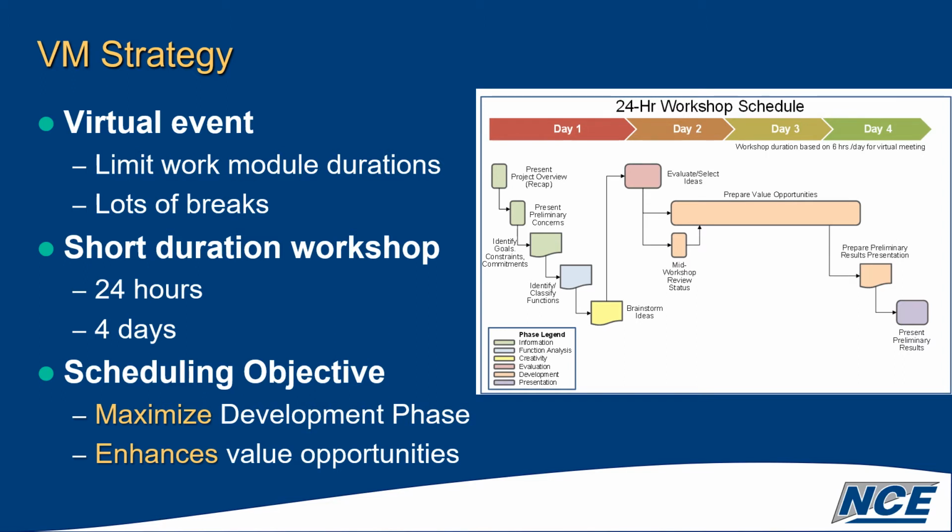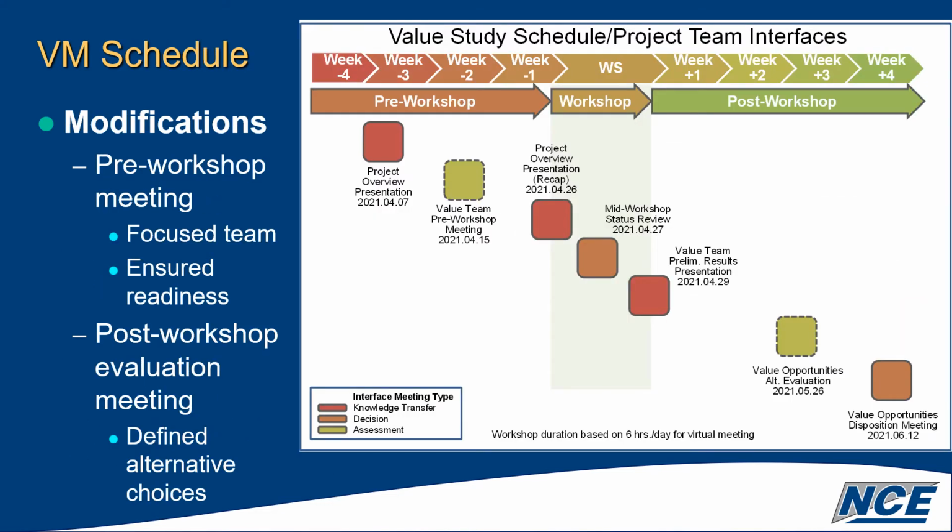So I'm going to discuss a couple of ways that we did this. Some of the modifications to a standard value engineering study incorporated here included what we called a pre-workshop meeting, shown in the first green box. We did a project overview presentation, and then partway through the VE team's review of the documentation, we had a meeting which allowed them to talk amongst themselves, focused them, assured that they were going to be ready, and we produced some slides that would be shared during the workshop.